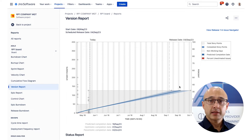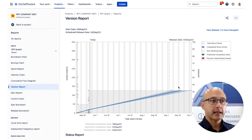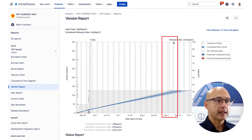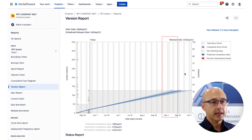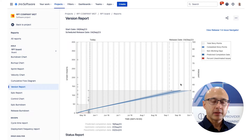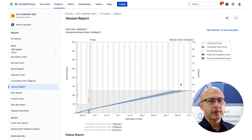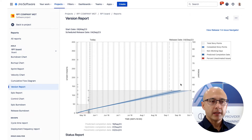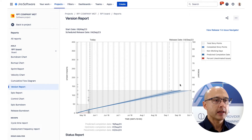Another useful piece of information is the actual release date you've put on your release, shown as a dotted line — in this case the 4th of September. If the predicted completion is beyond that date, you'd probably want to figure out if you need to talk to your product owner, or rejig the product backlog and take some items out, then re-communicate what's going to be delivered to your stakeholders. It's just a bit of a warning sign to keep an eye on.